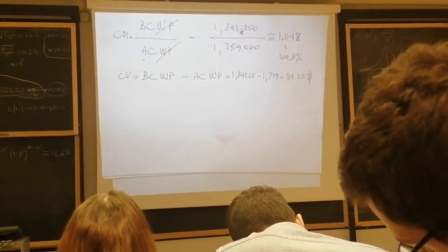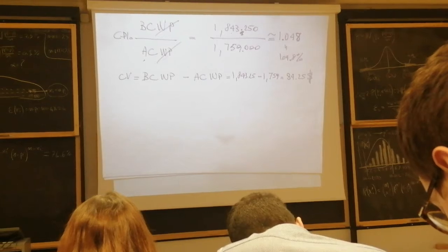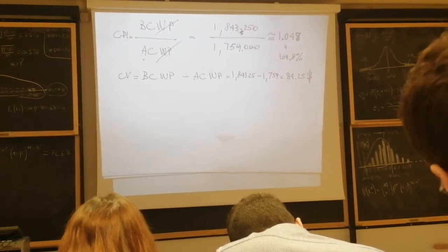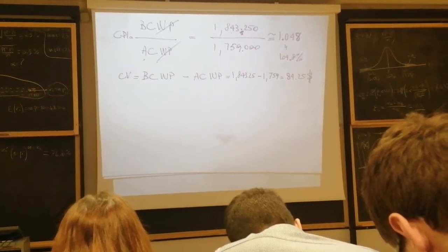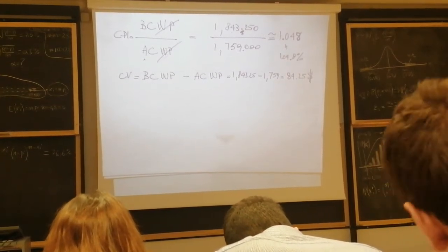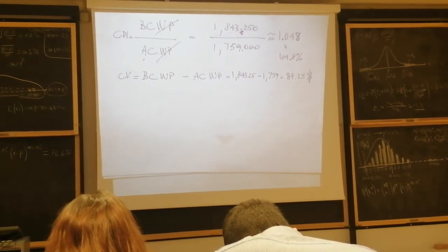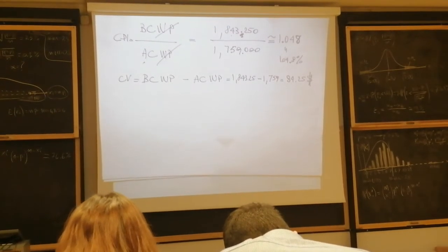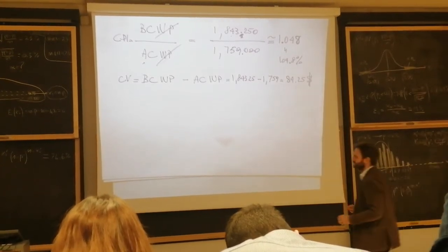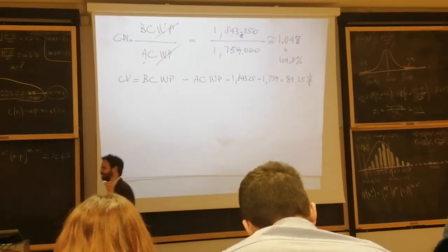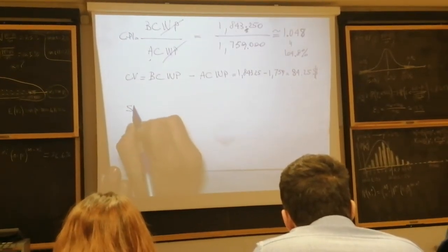Now the second set of questions: are we ahead of time or are we lagging behind schedule? The same reasoning we have done for cost applies. You find the ratio and compare the budgeted cost of work performed and the budgeted cost of work scheduled.